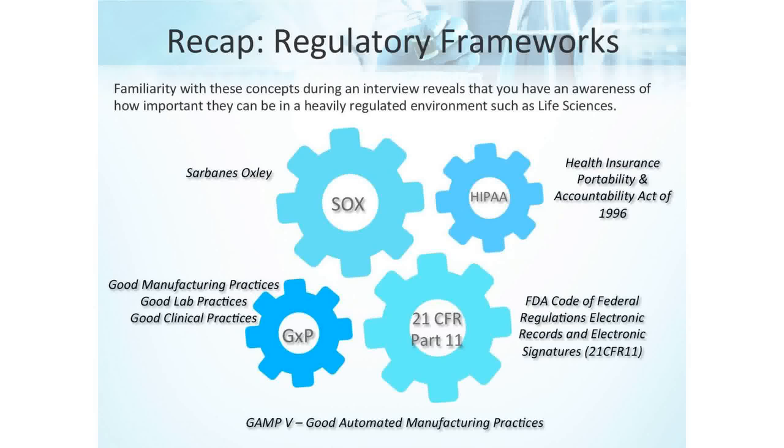That's very important. Number two, ask yourself, if a user can access data remotely, does the solution satisfy CFR Part 11? And that means that only authorized users can access confidential data. And number three, if there are changes to the data, is CFR 11 satisfied? Are there audit trails to track who changed what and when? Those are very important questions. Yeah, well said. And it's critical, and you'll hear that a lot today.